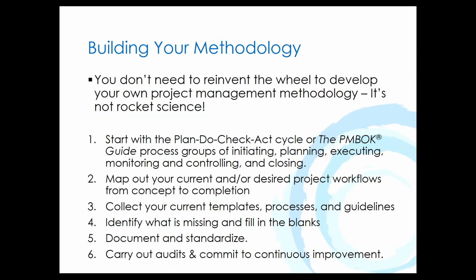So when you start to build your own methodology, you don't need to reinvent the wheel. It's not rocket science. It's very simple. Here are some suggestions to help you start. You could start simply with the Plan, Do, Check, Act cycle, the PDCA cycle from Stewart and Deming, or you could pick up one of the BOKs, the PMI's PMBOK guide, or the APM BOK, or ISO 21500. They all feature similar processes for the project lifecycle of initiating, planning, executing, monitoring, controlling, and closing. Start with that to generally describe how projects work in your organization.